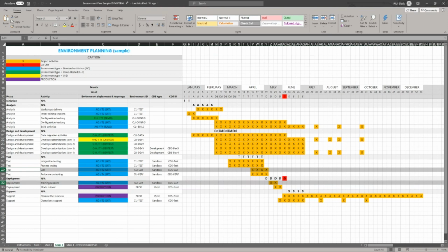In fact, immediately before that. So this is a potential challenge for our project in the sense that if our UAT testing is not concluded or is for some reason delayed, that can have an adverse impact to our training schedule, because it's unlikely that you can conduct acceptance testing and training in the same environment at the same time.